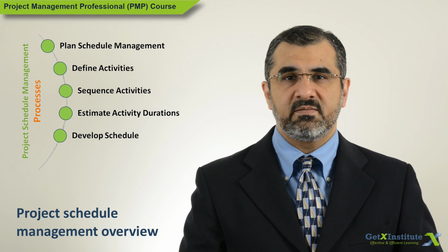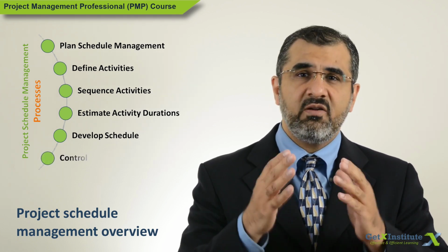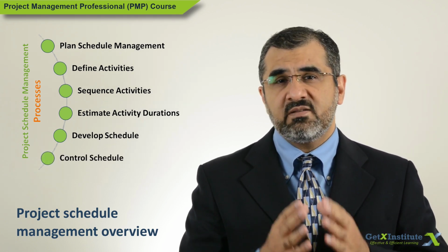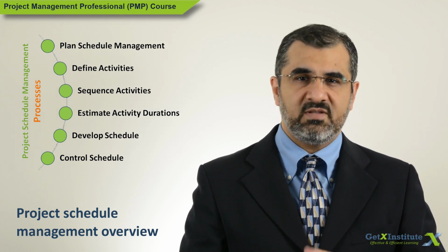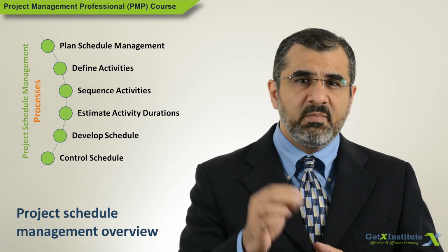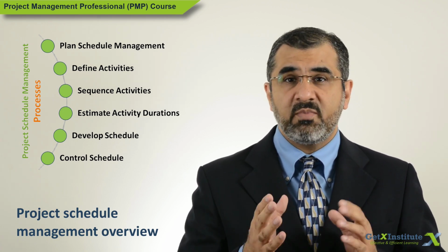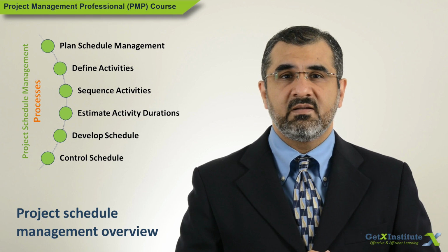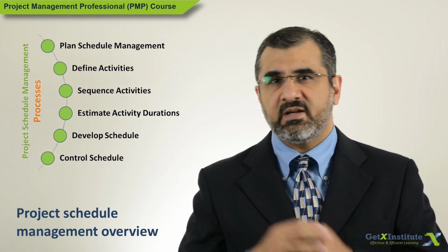Once the project manager feels comfortable with the schedule and the sponsor or other approving authority agrees, it will be baselined. From this point onwards, as work progresses on the project, it will be tracked on the schedule and compared with the baseline. That comparison will establish how the project is progressing, on track or off track.